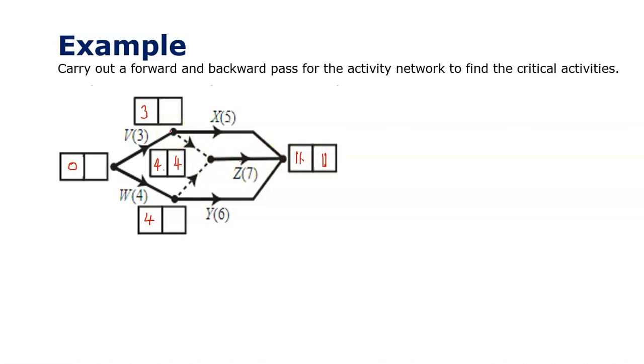And now what I want to do is make these as small as possible going back. So that's 4 that way, and that's 6. I think that's a 4. Now this way, we're going 11 take away 6 is 5. But if I go this way, I get 4. So, okay, and you can see here 4. Take away 4 is 0. And it is always going to be 0. That's going to be the smallest one.